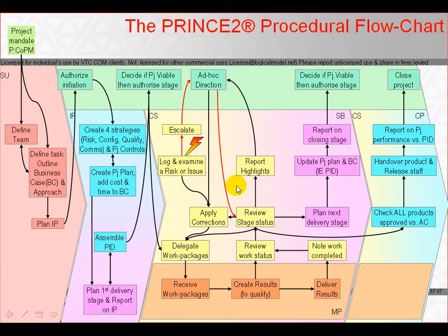Corrective actions amend, delete or add work packages within the current stage's scope. Alternatively, the project board may ask for a plan to react to the new context, or they may close the project prematurely.